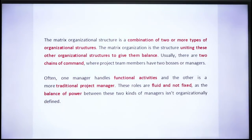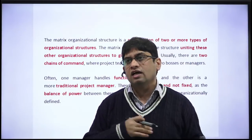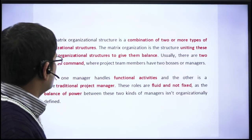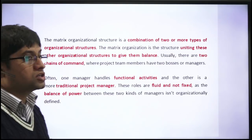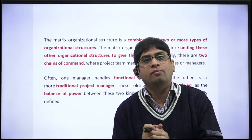Matrix organization structure is actually the combination of two or more different types of organizational structures. What we do is combine different organizational structures in a balanced way. There are two chains of command — an employee reports to both the project manager and the functional manager. Functional activities are handled by the functional manager and the project is handled by the project manager. These roles are very fluid — not clearly defined — and that is one main disadvantage of matrix organization.